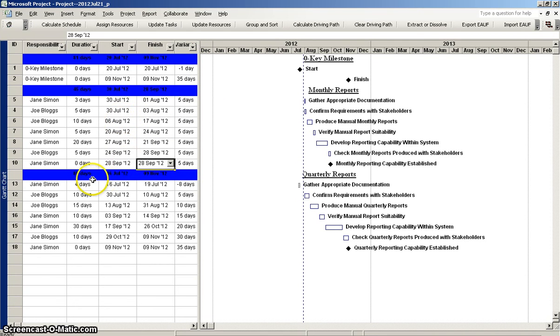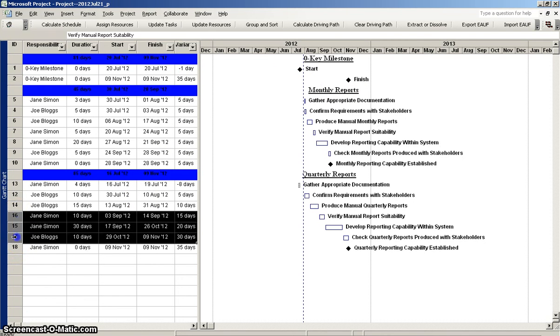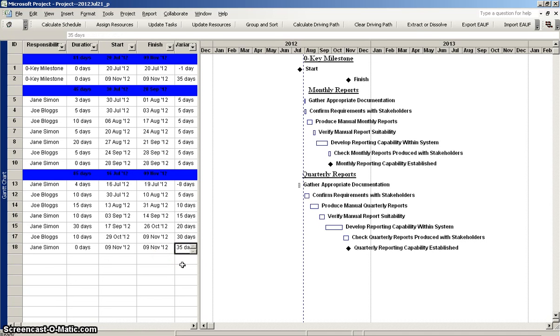So what we've got now is a new look at how these dates have moved since the last import. What this shows is that the start milestone actually finished 1 day earlier than expected, and the finish milestone has finished 35 days after we were expected. I suspect that's because I didn't calculate and have the right dates in for some of these values, and so when I hit the calculate button we get new start and finish dates. So this shows how these have moved since the past update cycle, since I saved that Start 4 Finish 4.